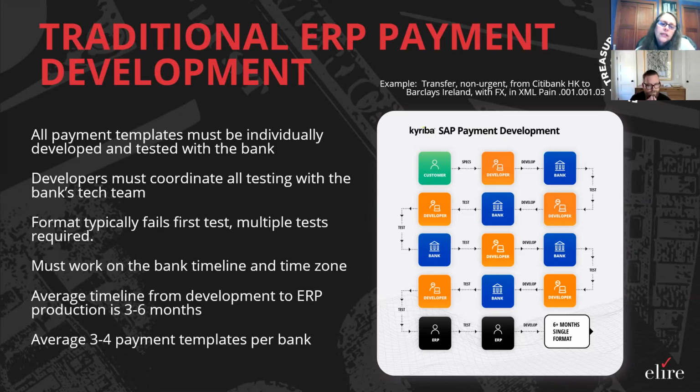The average time it takes to develop the bank connection is 3 to 6 months, and that's for each format. And typically we see an average of 3 to 4 templates per bank. So it can become a quite lengthy project.